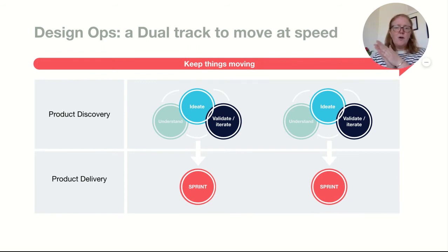You can do a couple of sprints on discovery and ideation, and then once you've got that validated, you push the delivery forward. Again, it depends on resources. But the idea is that once you've committed to the product delivery sprint and the scope of that sprint, you don't change your priorities, because that's where inefficiency happens. That's where, if you listen to people saying, "Oh, can we just do this?" No, if it hasn't gone through the process of discovery and validation, it doesn't go into the sprint.